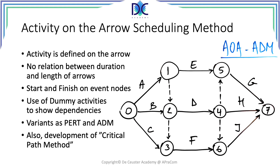We also have the activity-on-arrow scheduling method. In this diagram, events are numbered 0 through 7. An arrow indicates the work being done: for example, the arrow between event 0 and event 1 represents activity A, where 0 is the start event and 1 is the end event. The length of the arrow is not related to the duration of the activity. Dotted lines represent dummy activities, which are necessary to correctly build the network.